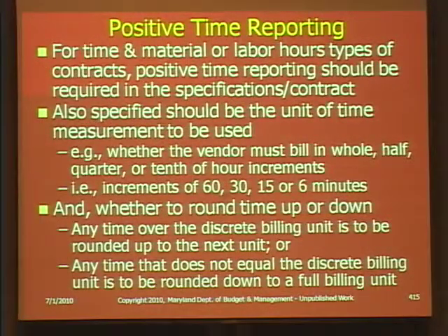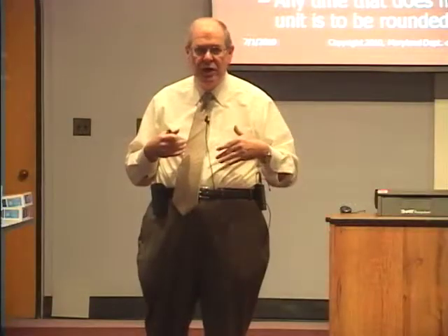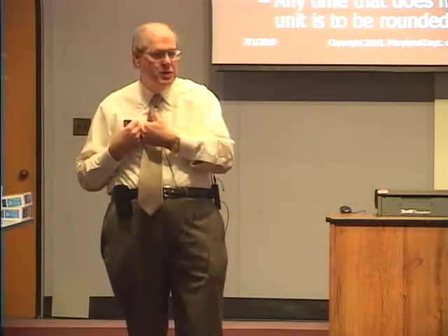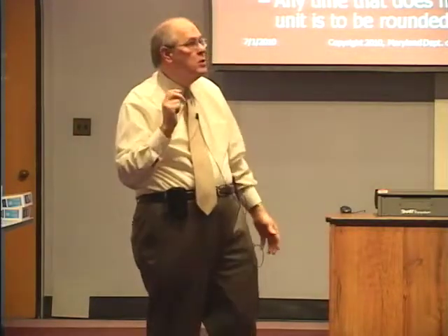And most people think, well, if it's time and material, you get paid by the hour. Except vendors frequently want to bill at least on the quarter hour and sometimes on the 10th of an hour, like every 6 minutes. So they get into more increments and get more billing. So if you don't specify, it's a minor area of potential conflict, and usually they're going to say, this is our normal fashion of billing, and if you don't have something that says otherwise, you're probably going to end up doing what they say is their normal routine for billing.